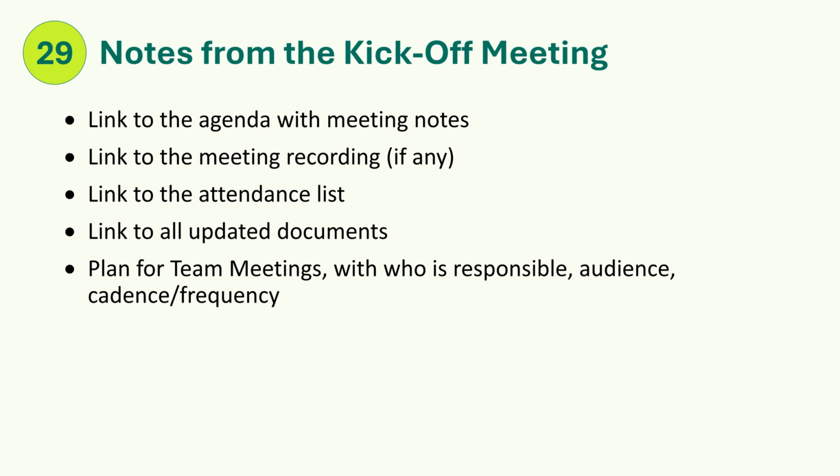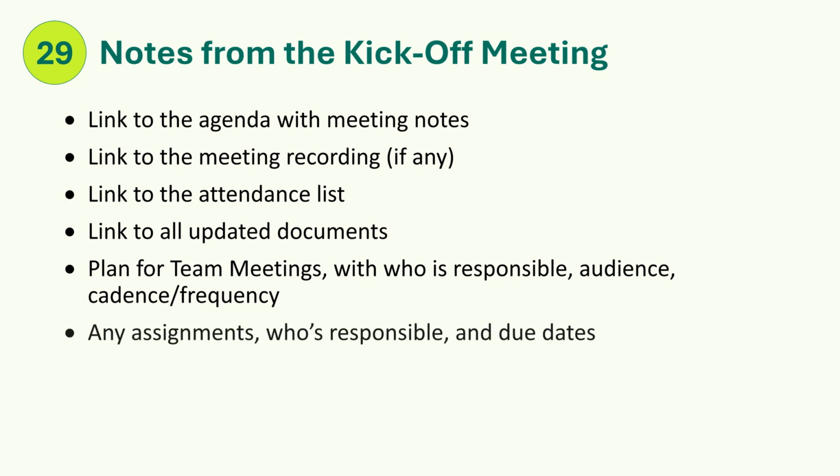Your plan for team meetings, with who is responsible, audience, cadence, frequency. Any assignments, who's responsible, and due dates. And next steps. File the meeting notes with the kickoff meeting agenda, PowerPoint, and other related documents in your project SharePoint site. And email the links, rather than emailing the actual documents.